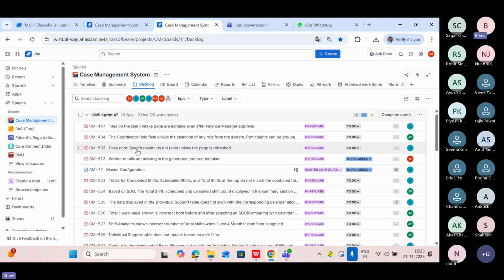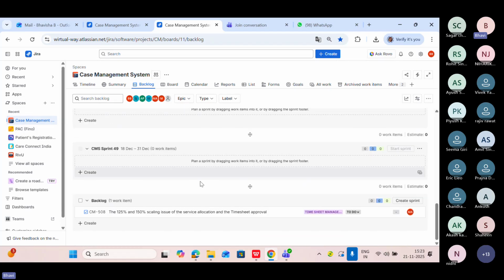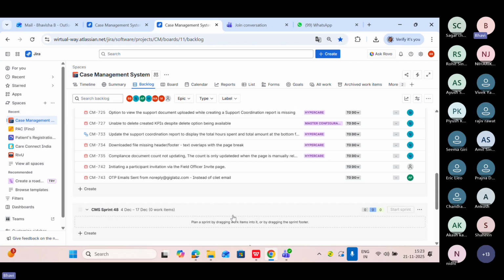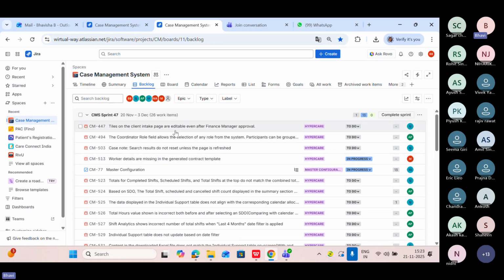And in the sprint backlog, these are the important tickets which we need to work on. Whenever we are doing any scrum call, we are confirming with our developers or QA which ticket we are working on. These are the priority tickets which we need to complete in a particular sprint. As we are following 2 weeks of sprint, we need to complete all the tasks of the 2 weeks of sprint. If some tickets are not important, we can put them in the product backlog. If some tickets are on priority, we just have to move them to the sprint backlog here.